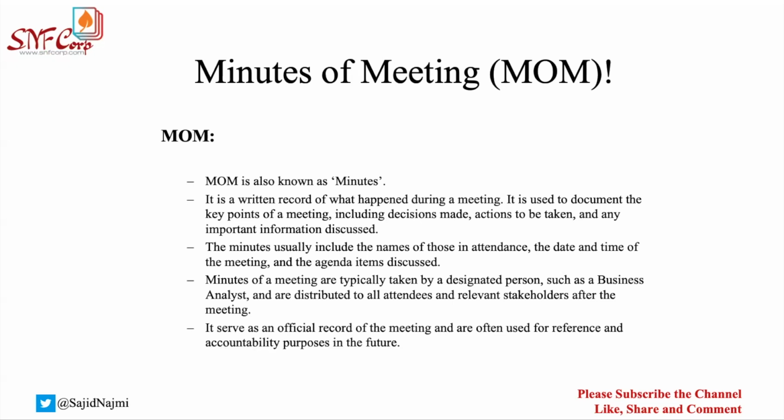So it is very important for you to write things very clearly and precisely, and to document any action and its due date. We cannot have an action without a due date. Due date is very important: when are we targeting to close that thing.